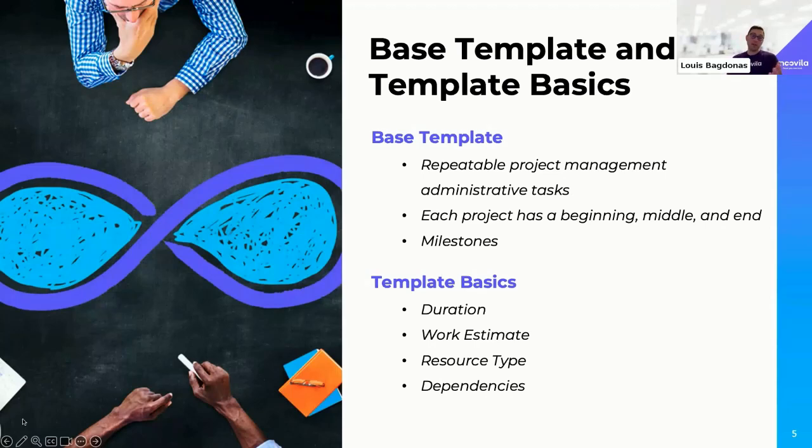Rob mentioned on our webinar last month that any work that is less than 30 minutes can probably be grouped together, right? So looking at those budgeted hours, that work estimate, as a point of reference for whether or not it should be one task or multiple tasks, and then duration as well. Internally, we always recommend that for anything with a duration over 30 days, you need to split that work up, right?